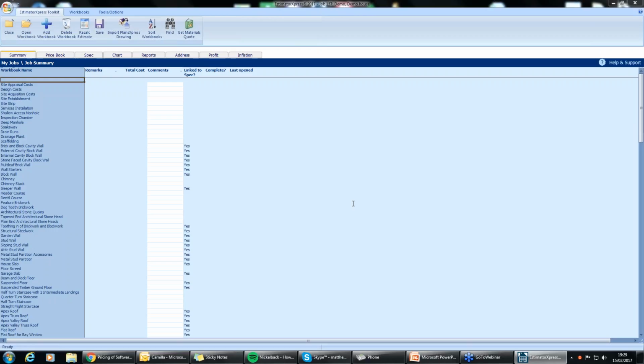So what you'd be able to do is you'd be able to pull in those multiple jobs that you're actually doing, or those multiple estimates, or if you want to include all of those within one particular estimate, again, the reports aspect will be able to show you everything you need from labor down through to your material. However, what I would probably do is if you're actually building, say, 8 houses at once, I would create the first estimate for the first house. Okay, and then what you can actually do is copy that full job and multiply it by 7 or 8 times.